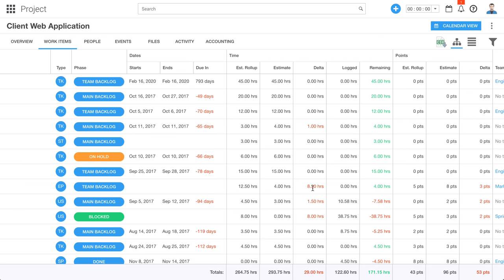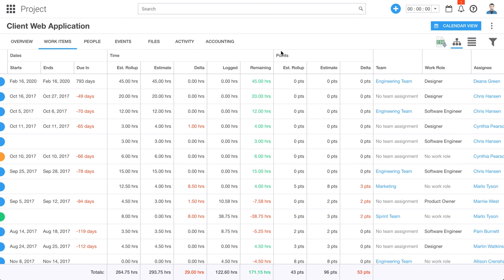This can give me some indication in terms of how accurate I am at estimating how long things will take, and then it shows me the delta between the two — so in this case, I was way off on my original estimate. This is great for planning purposes when you don't yet know the level of granularity you're going to need for the project and you just want to get a high-level sense of how long you think that project will take and what the cost might be. Additionally, you can view how much time has actually been logged against the project, and then you get a delta between the logged time and what your estimate was. You can also do this in terms of story points, which is more of an agile approach to gauging the level of difficulty of a particular item.